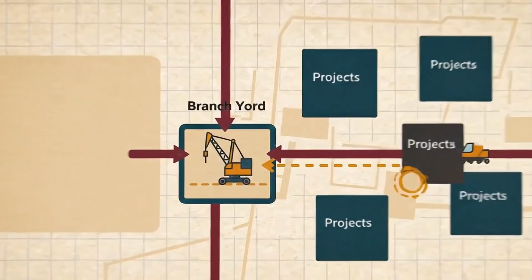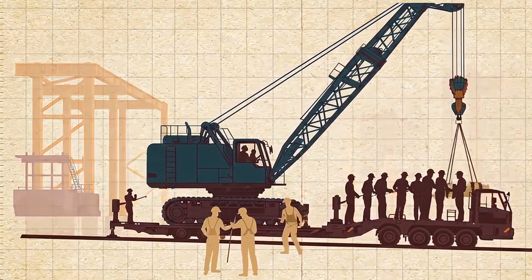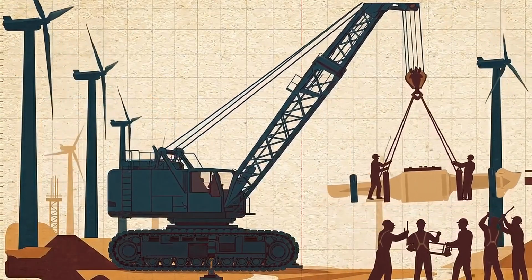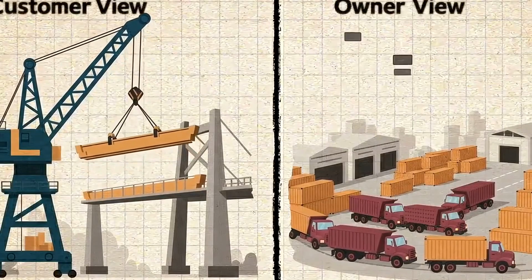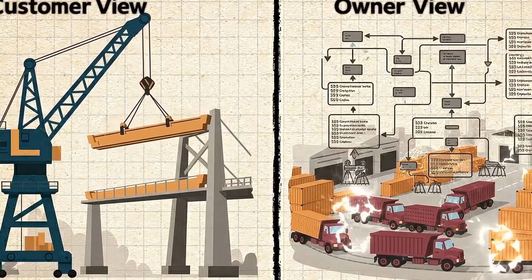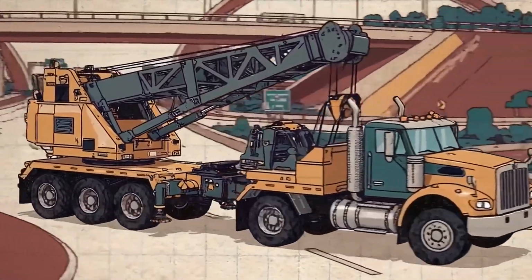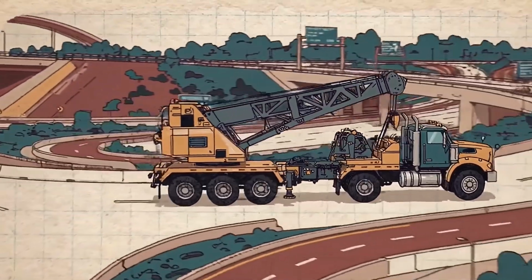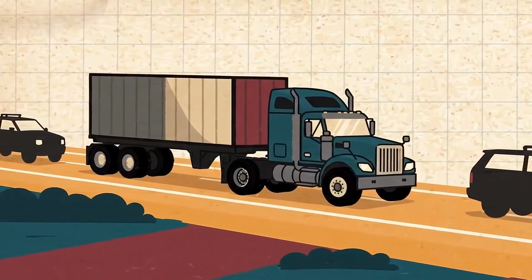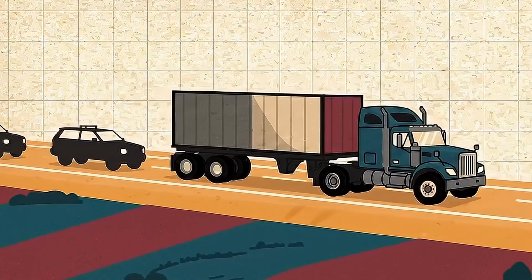So why did the Indianapolis project need this machine in the first place? A smaller number on a rental quote is not automatically a cheaper project. This is where the crane stops competing only with other cranes. According to the contractor, the Indianapolis job needed the LTM 1750 to work at about a 120-foot pick radius. But the contractor also points to a second reason. After one night of beam work, the crane had to move from the north side of the project to the south side. The contractor says the all-terrain crane made that transition in about 8 hours.